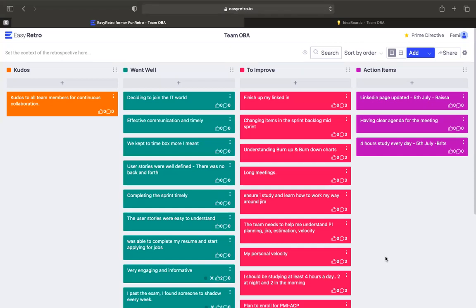So what do I do as a Scrum Master? I'm going to talk to those people, and I'm also going to speak to the manager of the development team, to ensure that we know that, yes, things are going on, but this delay is not good for my team, because developers are not happy with what is going on. How can they do the work and be delayed because of people? So that's one thing they talked about at the retro. So that's an action item that I need to follow up with as a Scrum Master. That's a live example. There will be different things that they will talk about that you need to work on, and they also need to be accountable for. And this is why we do retrospective.